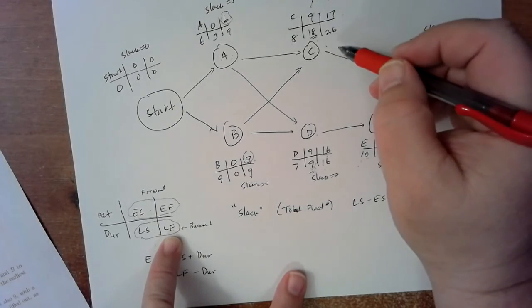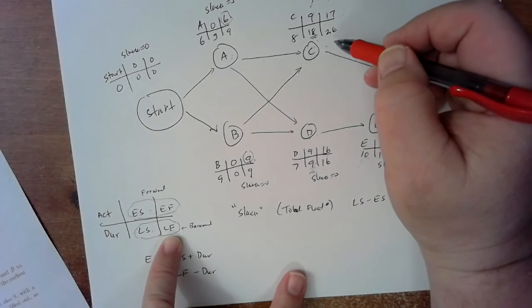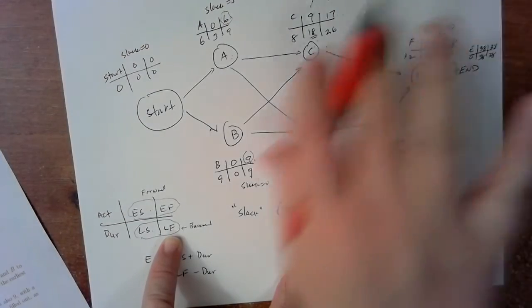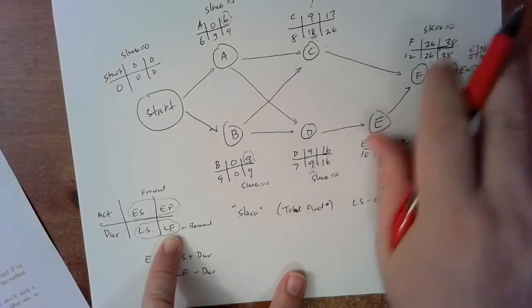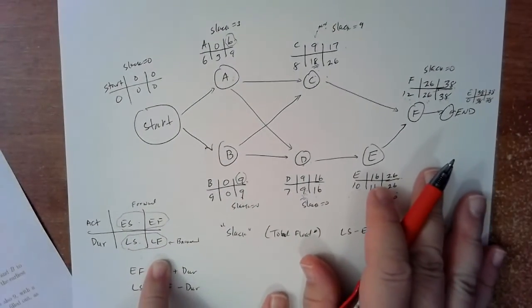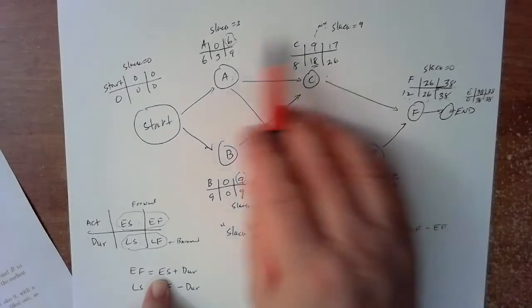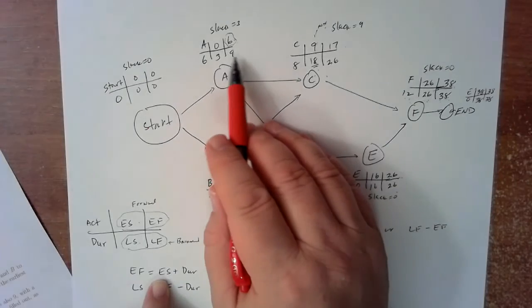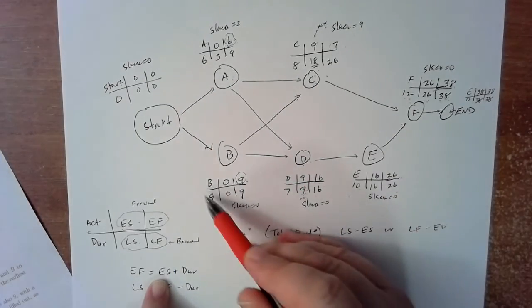The slack is telling us that we could shift the time forward by 9 units before we run into trouble, before we have to shift our times forward for the entire job. Oops, I ran off the page there. Can you still see that? That's slack 9. That's slack of 3. Okay, so there's some room for maneuvering in here that doesn't exist for these other ones, right?